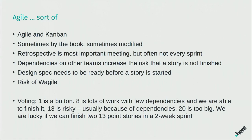The risk of a story not being finished usually depends a lot on dependencies on other teams. We have to eat our own dog food — we're often using APIs from other teams, a mobile SDK, a translations team, an analytics team, and designers on another floor. We found, for example, that design specifications need to be ready before we can start a story, otherwise we wait half a sprint for new icons or designs. We always risk switching into agile without being truly agile because we need design specs beforehand, or because in a big company there are gates — a gate to start development on a project, and a gate to release it.